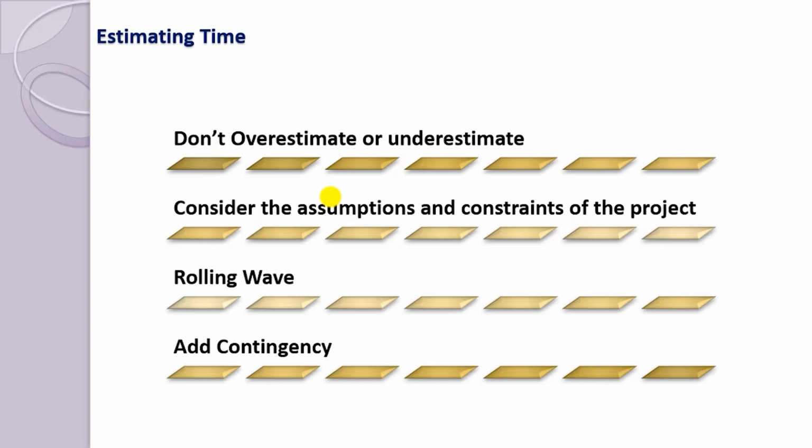This could either be achieved by increasing the estimate for those tasks or by specifically adding extra contingency in your schedule. Some practitioners suggest automatically adding 40% to any estimate to combat over optimistic tendency and to allow time for things to go wrong. So it all depends.